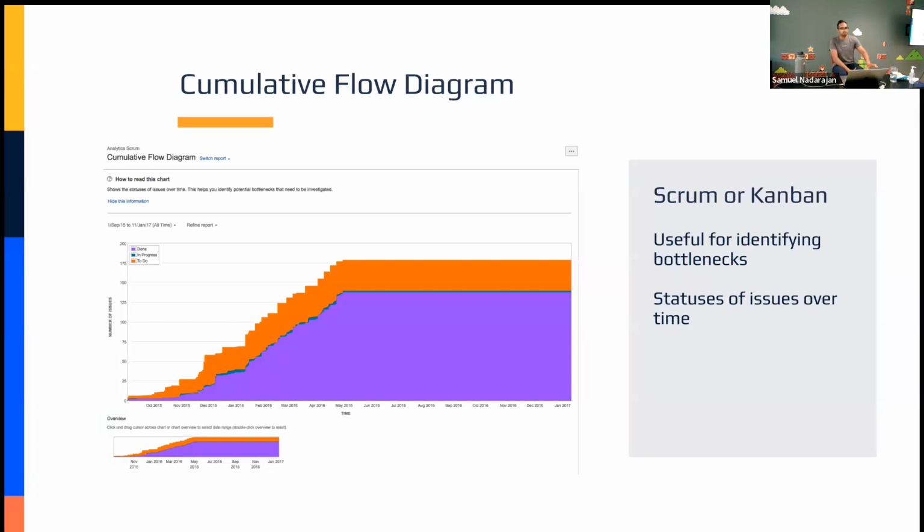Your to-do column represents the total, if you look at the y-axis here, this is going to represent the total number of issues. So as you create more and more issues in your Kanban board, I would expect that orange band to grow up. That is similar to what we saw in that burn up chart with that scope line, right? That scope work or work scope, I forgot what the name of it was. We would expect to see a staircase, if you will, that gradually grows. So the interest here is not necessarily in the top line of your to-do issues, but all the colors in between.